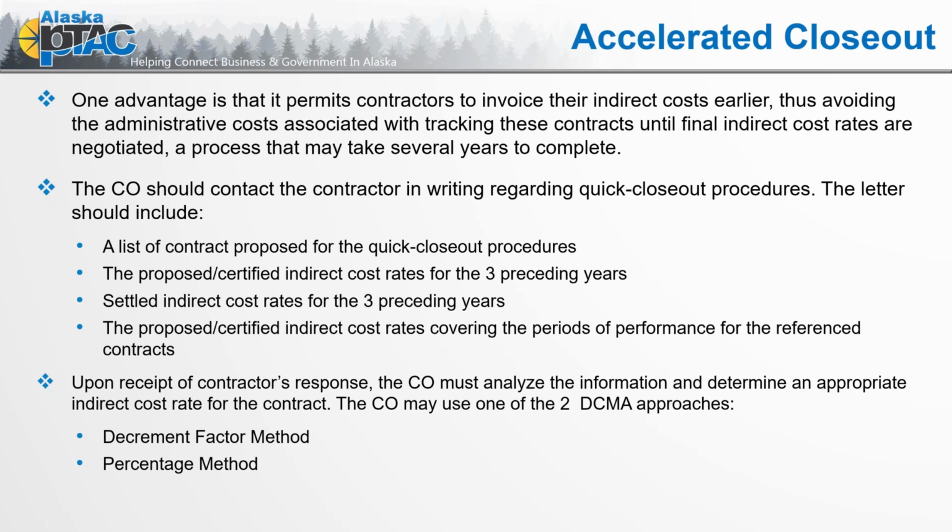When we're doing a proposal, we're bidding our costs and we're building in those indirect rates, we are looking at our overhead, we're looking at those costs, and of course that percentage that we're adding in is based on the previous actual years, where we can see a history of our cost of doing business and where it escalates.